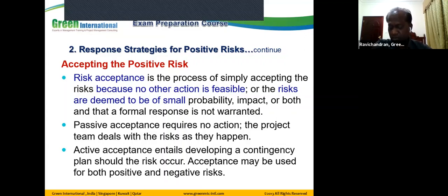So in order to minimize the impact of this risk, we need to continuously monitor the triggers which may cause the response plans, which are contingency plans, to activate. So what we did, we had a weekly or bi-weekly progress meeting with Qatar Cool in order to understand their planned progress, even their procurement status, and also